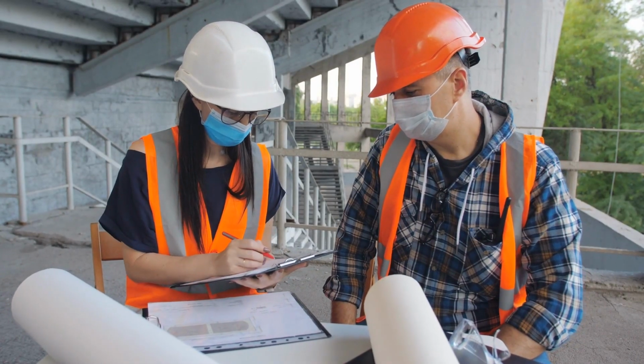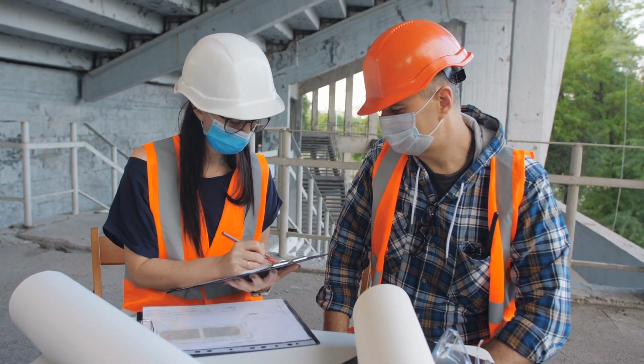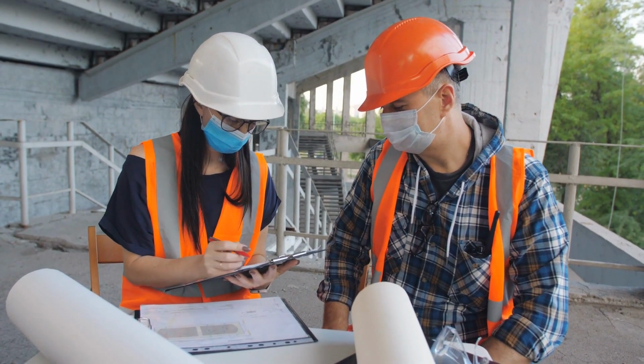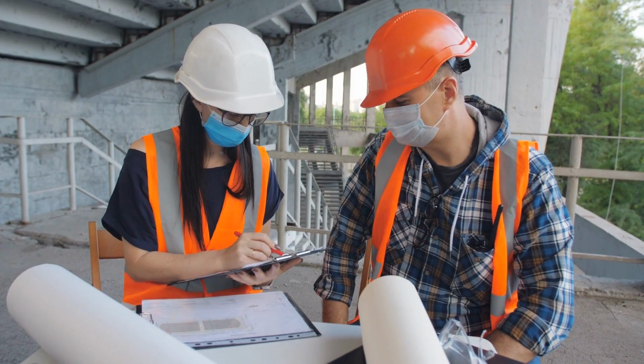Your contract does not identify the separate third party who is responsible for final commissioning, or worse, expects that an existing group such as the designer or installer is also responsible for final system acceptance during commissioning. These are the equipment procurement warning signs.